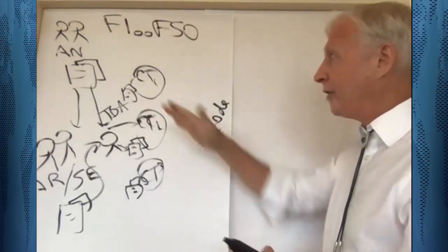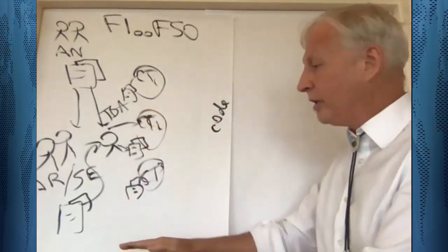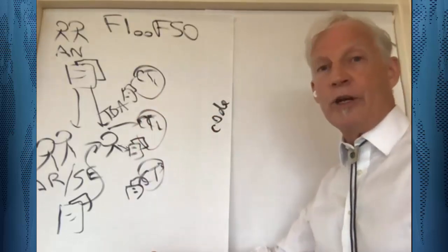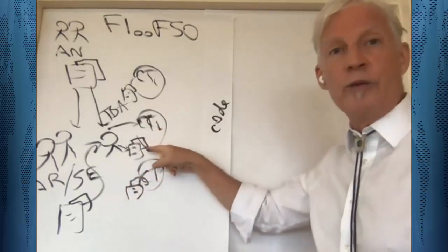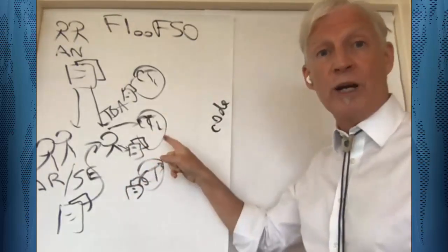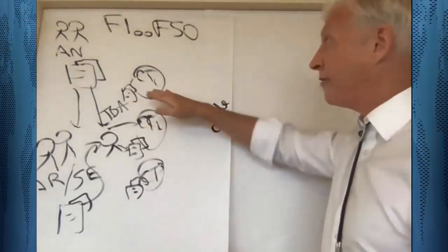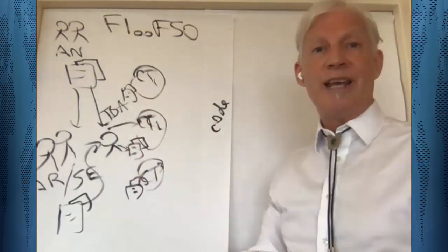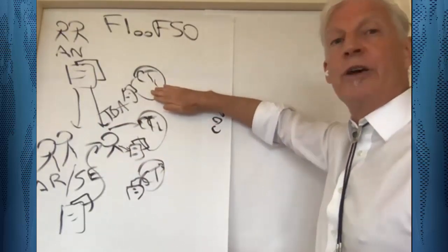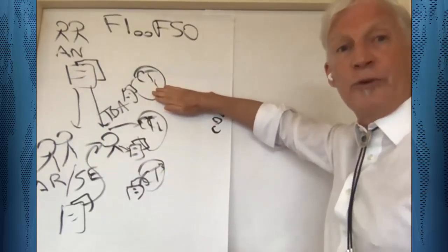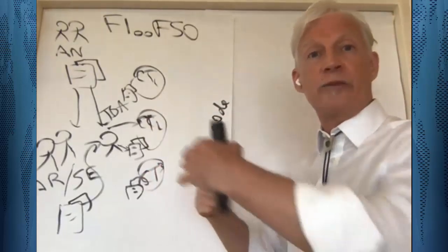One issue is that there's a lot of component teams with their different component tasks, and there's typically people from different organizations that are providing pressure into the development organization who want their component task for their requirement of interest done first. That leads to a shuffling of priorities, so that, for example, on January 10 at 9 a.m., there's no guarantee that this component team is working on the component task that's for the same requirement as this team and the same requirement as this team. They could be working on component tasks for different requirements.